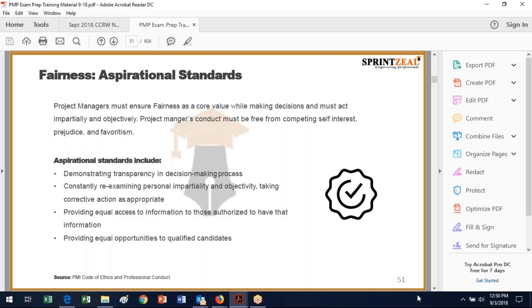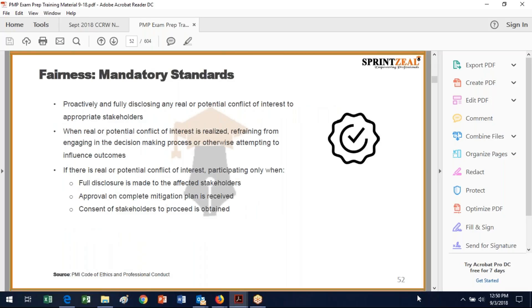In terms of fairness, the aspirational standards are acting impartially and objectively — free from self-interest, prejudice, or favoritism. Aspirational standards include demonstrating transparency in the decision-making process, constantly reexamining your personal impartiality and objectivity, taking corrective action as appropriate, and providing equal access to information to all those authorized to have it. For instance, once you have a bidder's conference, everyone who has expressed interest in bidding must have access to any questions asked or answered. Provide equal opportunities to qualified candidates.